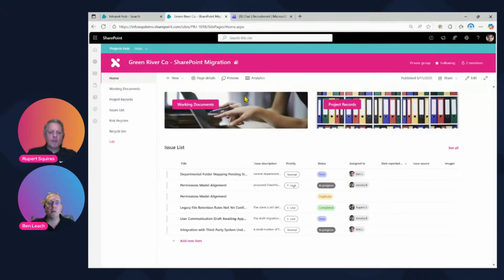But then on top of that, we're introducing SharePoint or Microsoft Lists to do things such as manage issues, manage our risk register, all of that kind of project RAID log type activity. Now, all of this has been standardized as part of our template. So as we create a new project, maybe it's someone in a PMO that might do that, they'll spin up the project workspace. The right people can come in and have access to it, and it's working in a consistent way.